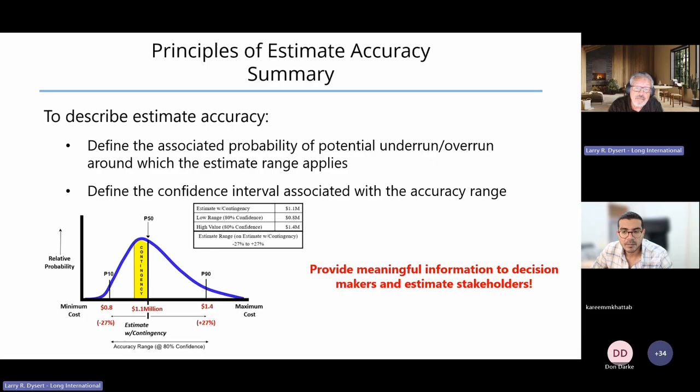And we need to be able to convey that information to management, who says, well, we didn't change the scope over the last estimate. How come it's grown? Well, it's because when we went through our P&IDs and our project definition, we had to relay out some of the equipment. We added additional redundant equipment to meet certain requirements that our project team wanted as far as redundancy or other issues.